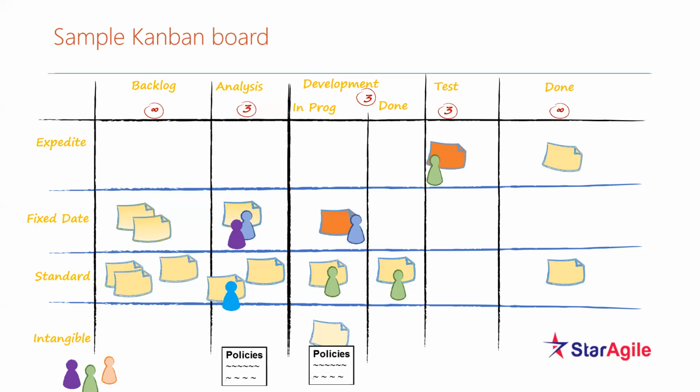Maybe as an example I mentioned sprint planning, but there is no sprint planning in Kanban. There is something called a replenishment meeting. The replenishment meeting happens when you are picking up items from the backlog to analysis. It is about which items get prioritized to be picked into your first commitment point.